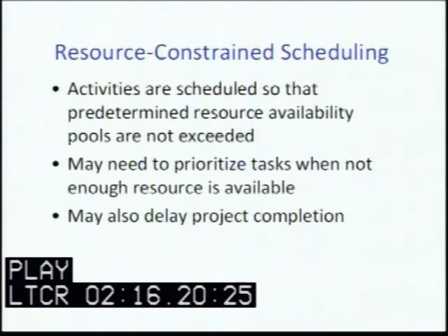And to do that, we may prioritize tasks when there's not enough resource available, or we may have to delay the overall project completion until it is. This can be a situation when you have a common resource that's assigned to multiple projects, and they're all of equal priority.